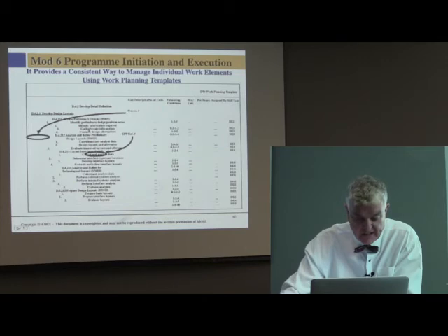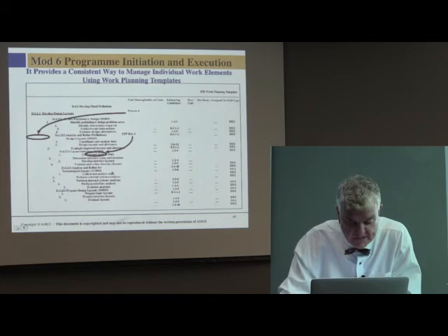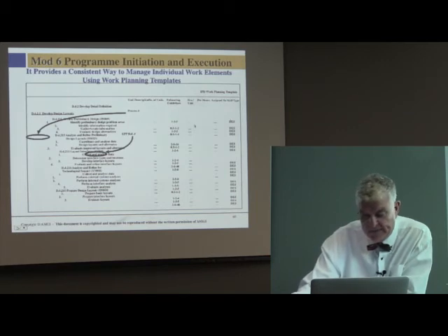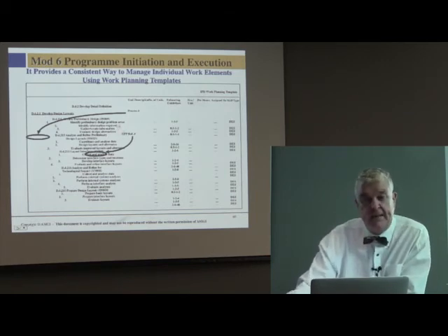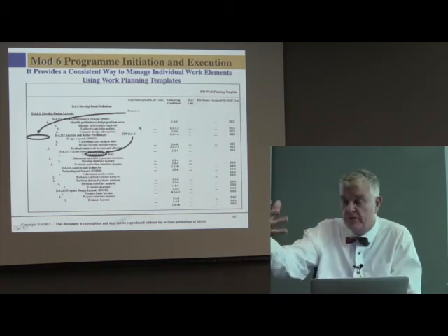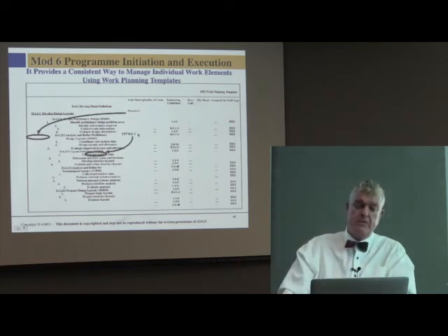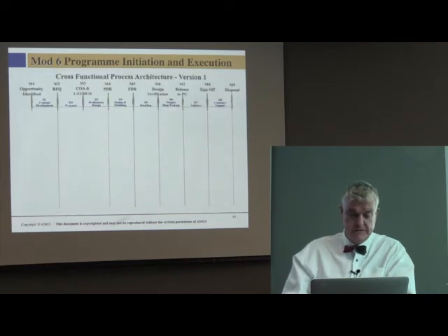So these are all the sub-processes: identify information, evaluate design alternatives, design layout alternatives, develop interface layouts, perform internal systems analysis. So this is the estimate of the time, the hours. A designer is required, that's the skill. So you get these work planning templates that allow you then to define how much time it takes for individuals to do work. This is all basic project management approach.